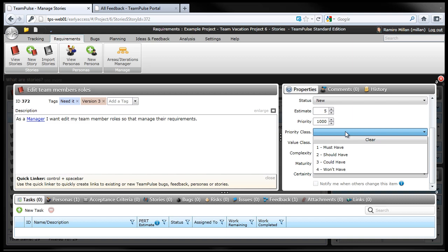So we know two things. Time and money are fixed assets. We can add additional money at a cost, right? We can add additional time again at a cost. So we can increase what we can do if we add additional resources like developers. Lots of times you don't have that luxury. So we're really boxed into what we can provide with the current requirement.